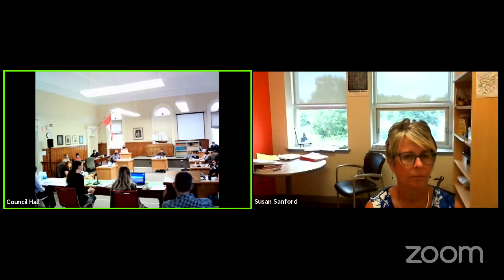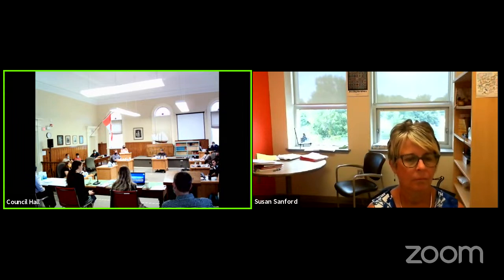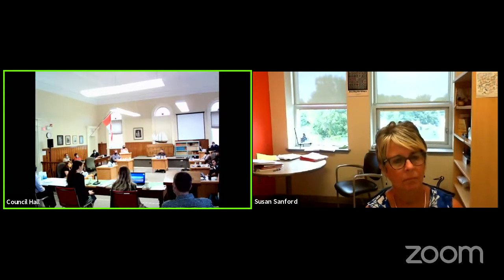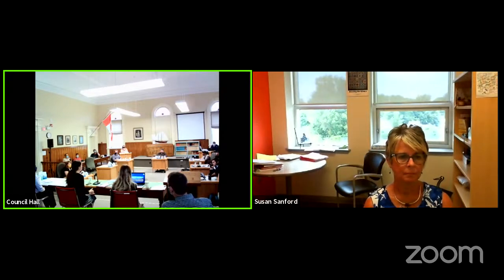The main regulator you're talking about here is Nova Scotia Environment, I assume. Nova Scotia Environment, but also some federal agencies, including DFO, Fisheries, would be definitely key ones. There are some permits that would be required from the town itself, also potentially from the Municipality of the District of Lunenburg. So the regulatory consultation and also land discussions are two things that can hold up the process and should be started as soon as the town has made the decision to proceed in order to make the whole process go as smoothly and as quickly as possible.